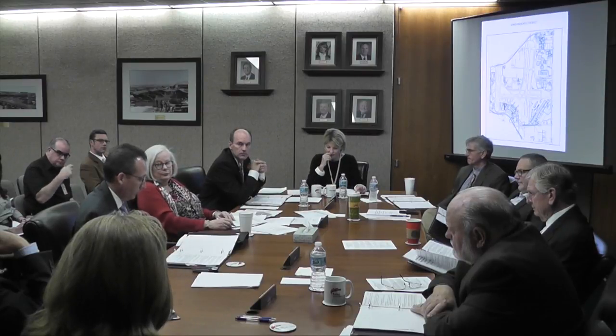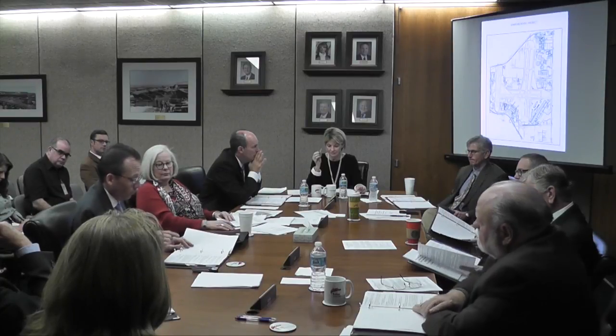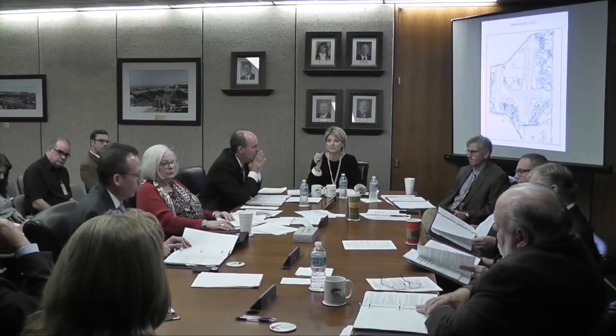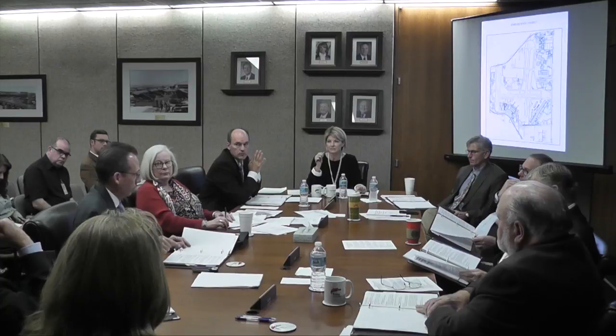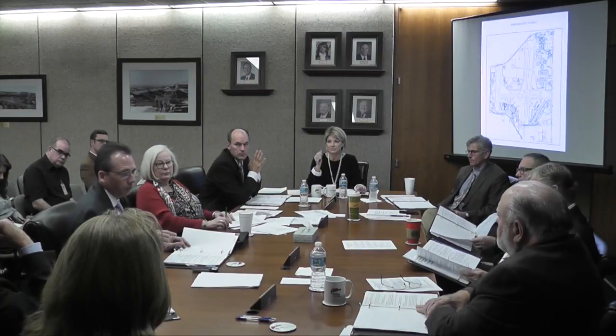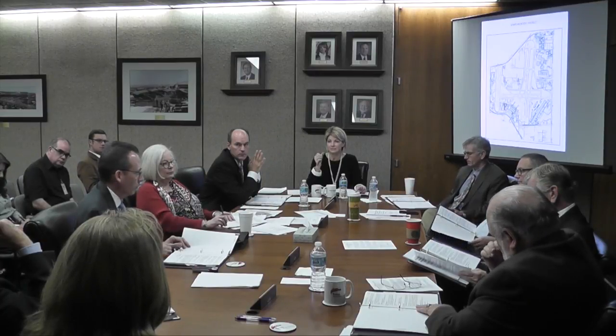I think our original estimate on this work was like $250,000 when we bid it the first time. We're probably a hair low on it, but anyway, we need to have some discussions with the FAA about how we're going to recoup the costs of these. And if we want to do this project on the control tower, I suspect we're going to wind up rejecting this bid and pursuing a much cheaper temporary option that will at least buy us a few years until we get more of an idea of what's going to happen with that control tower facility.